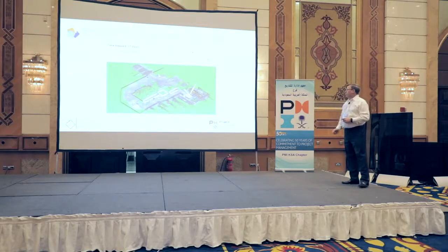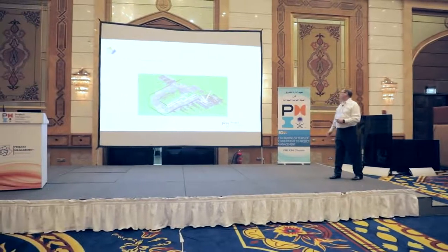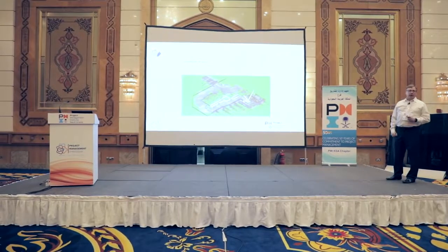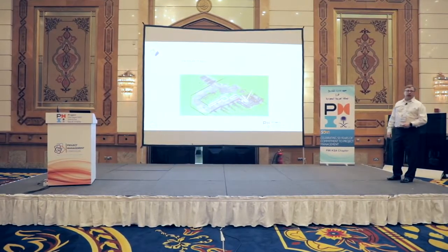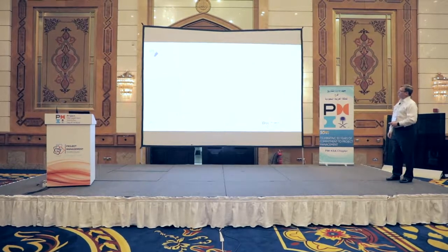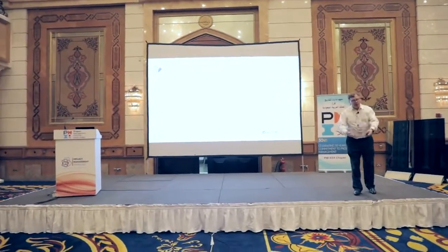Doing the 4D modeling, we can now see before the shutdown, we'll assemble our crane. After the 5 days of de-inventory, we can start our vessel movement. So we bring in our self-propelled mobile trailers, we perform the lift, we rotate, we put it on the trailers, and then we can move it through the actual site, and then finally out.